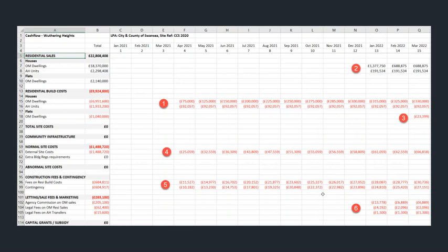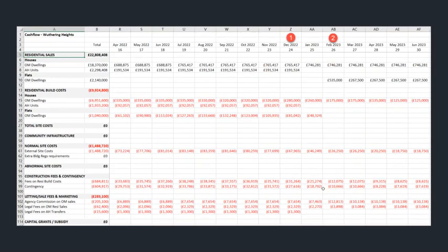We also see that dependent costs have been triggered through the default settings on the project sheet. That is, external site costs following the same pattern as build costs, and various fees and my contingency allowance on construction costs. Scrolling across to the right, the cash flow correctly shows that all affordable homes have been delivered by month 24, while construction and sales of the open market units continues.